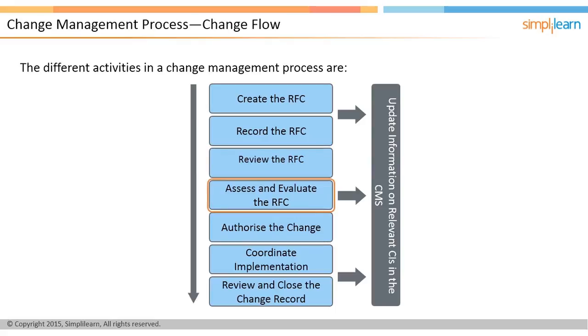The RFCs are then assessed, which may require the involvement of the Change Advisory Board or the Emergency Change Advisory Board for business justification, impact, cost, benefit, and risk associated with the changes.